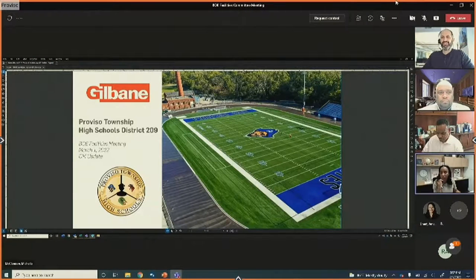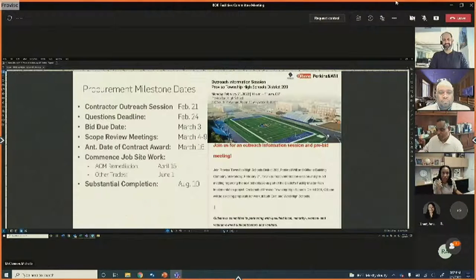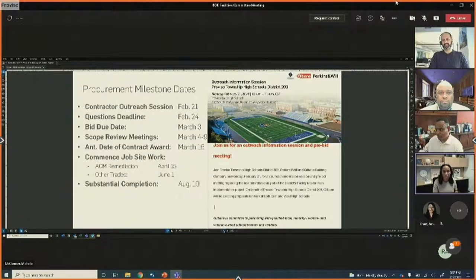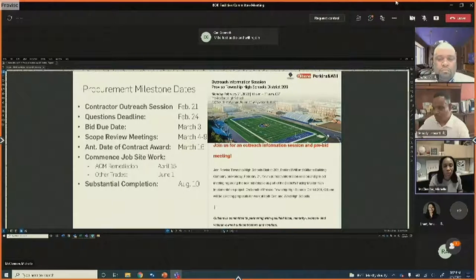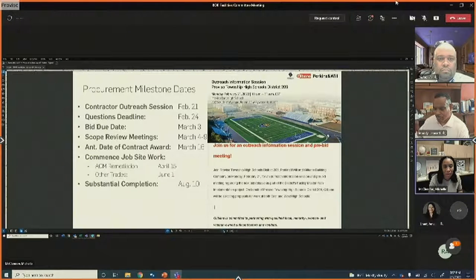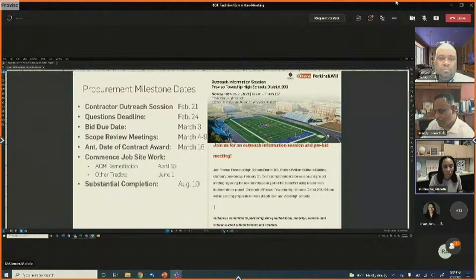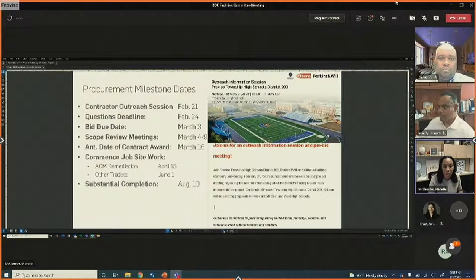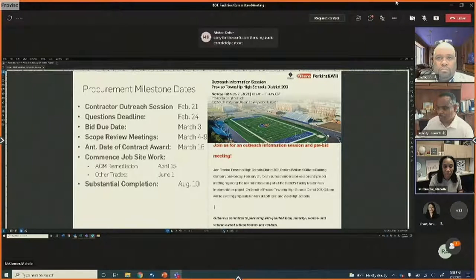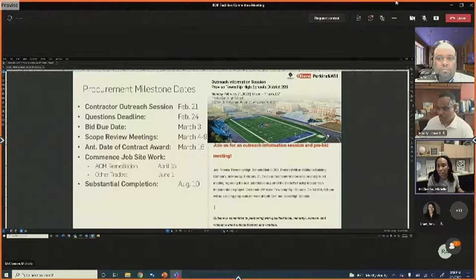Gilbane's CM update: they are currently out to bid for the next phase of work at Proviso West and East. A contractor outreach session was held February 21st, questions deadline was February 24th, bids are due back March 3rd, scope review meetings run March 4th through 9th, contract award is anticipated March 16th, ACM remediation must begin by April 15th, all other trades on board by June 1st, with substantial completion targeted around August 10th.